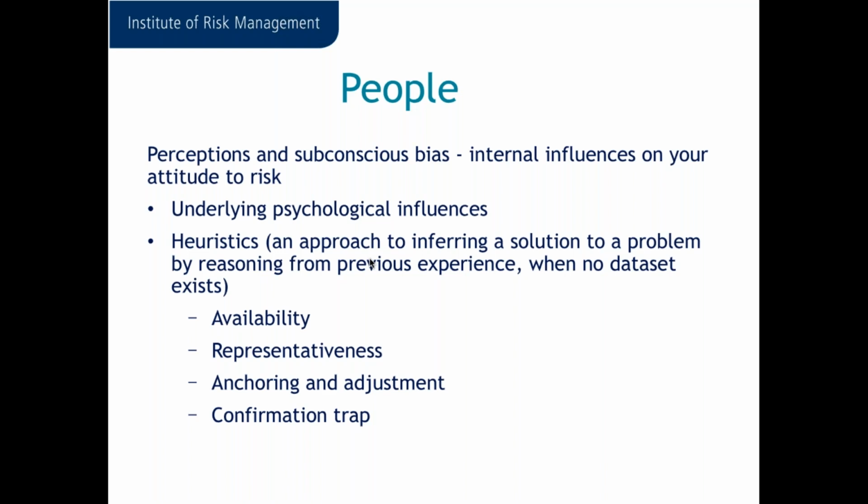The next one is called anchoring and adjustment, and this is where you start from an initial estimate and you vary around it, rather than thinking about whether or not the initial value actually is right. So somebody gives you a ballpark figure and then you stick with it, even though everything else has changed about how that ballpark figure was decided upon. So check whether or not that initial figure was the right figure in the first place.